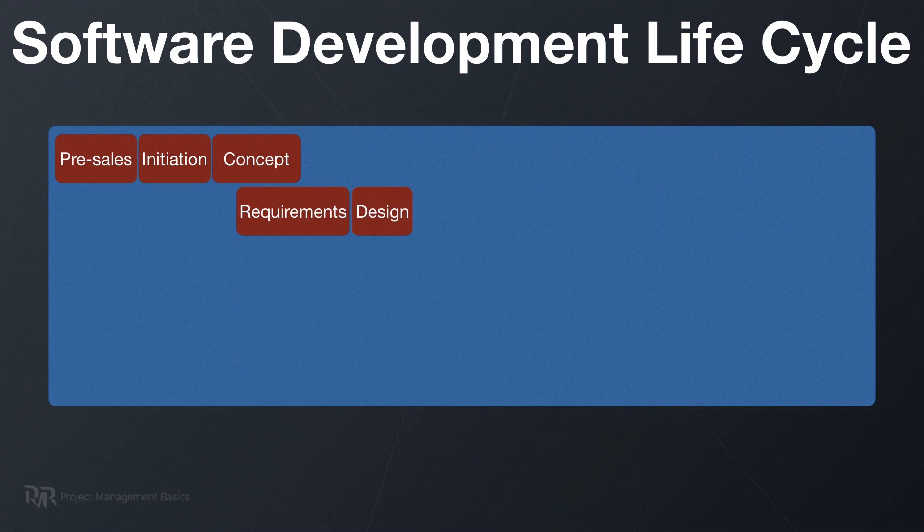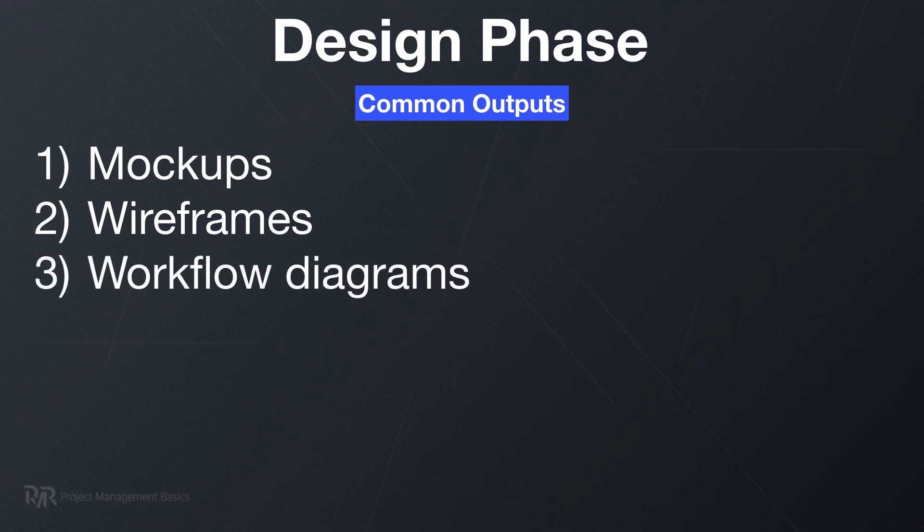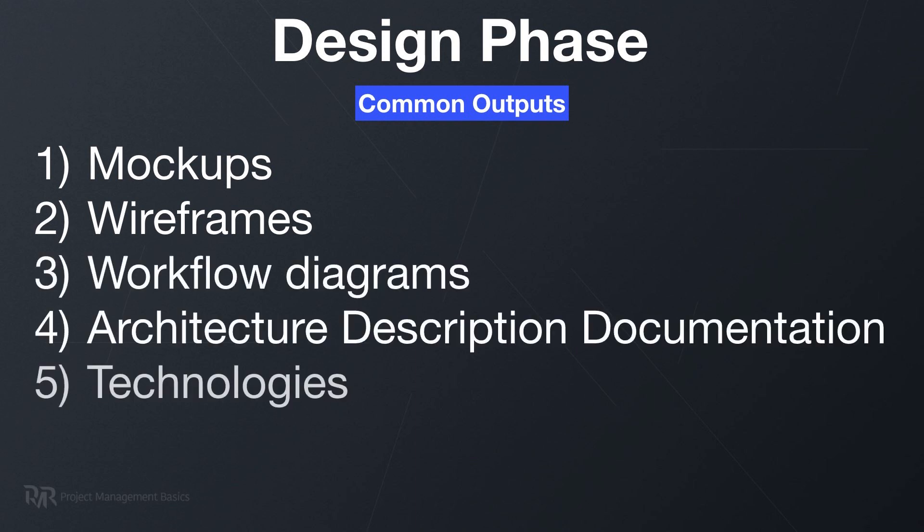Once you have requirements, you'll move into the design phase. There are at least two aspects here: technical architecture and UI/UX design. If you didn't follow the design-first approach, you do it here; otherwise, you finalize your designs in this phase. During this phase, you need to analyze the collected requirements, then develop an architecture that will support them, and also create a user interface that will make the application or service usable. The results of this phase are mockups, wireframes, workflow diagrams, architectural description documentation, lists of technologies, frameworks, and libraries.